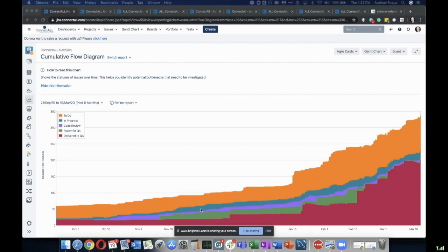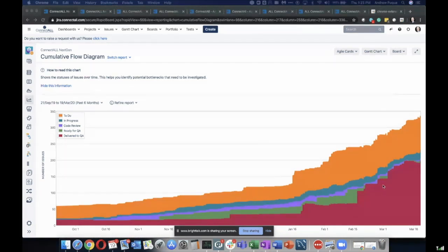For a quick example, I can see that my in-progress and code review has nice thin lines like you're supposed to see on a cumulative flow diagram. But my delivery to QA is choppy and steppy, and that didn't look good. I noticed that because I had Jira as the center of my value stream management universe, and I dug into it. I figured out why — we came up with a hypothesis for a process change, tried it, made an improvement, and the steps are smaller.